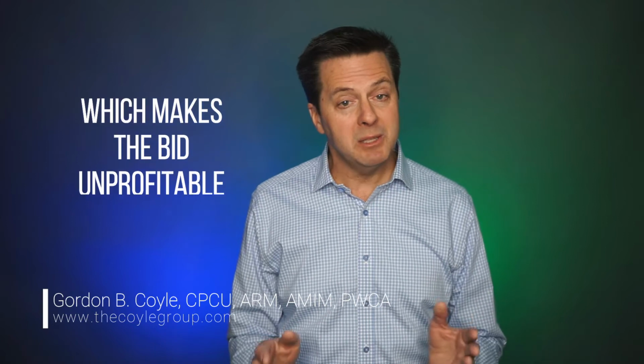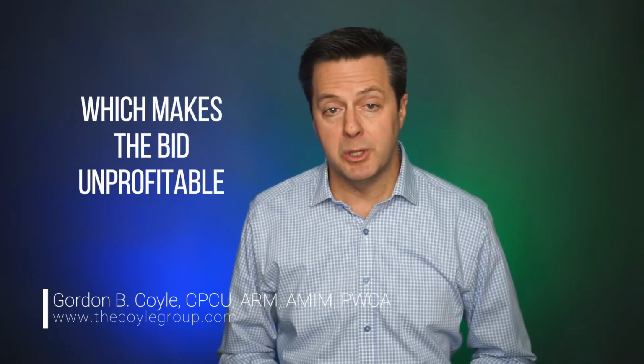So you may ask, what happens if you don't have everything that's required? Well, then you're going to need to amend or endorse your policy to reflect the requirements, and that can get expensive. One example that we see frequently are umbrella limits, especially with contractors working in buildings in Manhattan. It's not uncommon to see umbrella requirements to be $10 million. The problem here is that a contractor formulates their bid for a project, large or small. It could be as small as just replacing light bulbs, and they submit it to the GC or the building owner, and it's awarded. They never look at the insurance requirements, and now they've got a huge additional premium, which makes the bid unprofitable due to the added insurance costs.